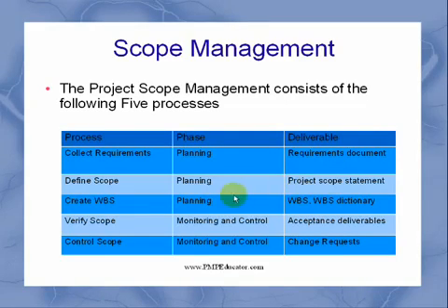After that, you have to break down what exactly is needed. Say you have the scope of building a dam, but then you have to break down each and every item required while building the dam. So you create the work breakdown structure, also in the planning phase. The deliverables are the work breakdown structure and the work breakdown structure dictionary. I will go into more detail about these terminologies in the next lecture.